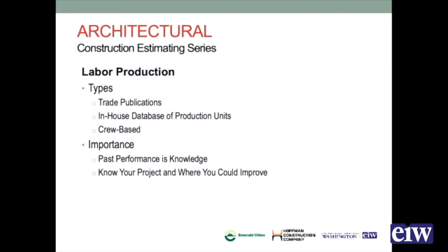Because you may say, hey, we didn't have very good production on this project, but we ran into X, Y, and Z on that project, and on this new project we're not going to run into X, Y, and Z, and I think we can hit half of that production, and really work hard at it. Knowledge is power, so you can take that knowledge and both improve your bidding and get your bids tighter, but also track it in the field against your estimate to make sure that you're staying to your estimate.